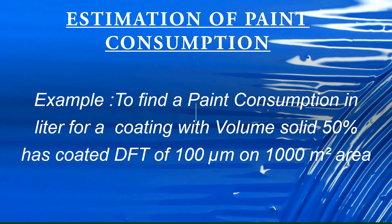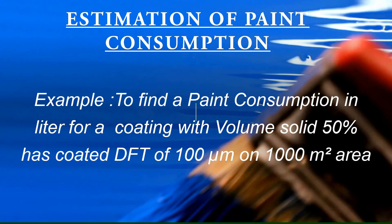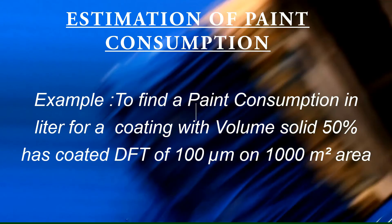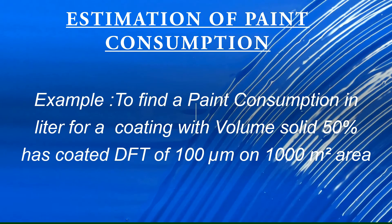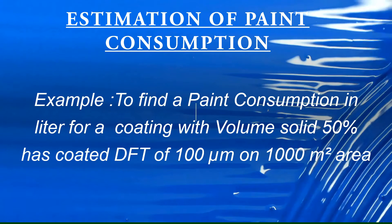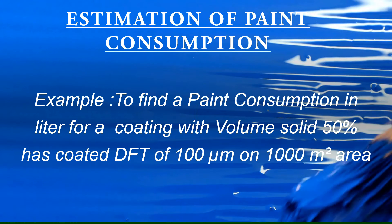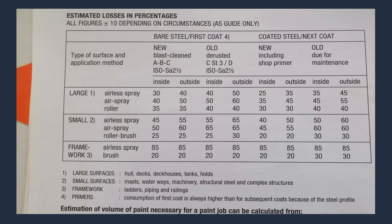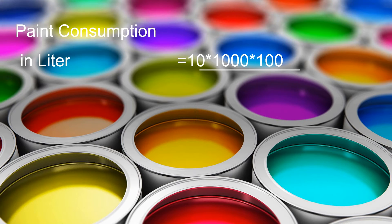For example, find the paint consumption in liters for a coating with a volume of solids of 50%, a DFT of 100 microns, over a 1000 square meter area. A table provides estimated losses as a percentage, with all figures plus or minus depending upon circumstances. Based on our example, paint consumption in liters = 10 × 1000 × 100 ÷ (50 × (100 − 40)).